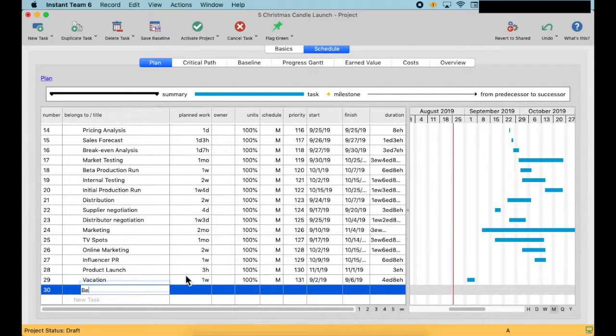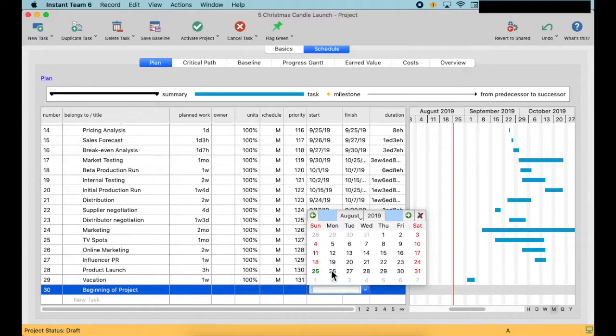A special task is a milestone. It is a specific moment in our plan. It is a task that doesn't have effort estimate. Milestone starts at the same time as it finishes. Often, it is used as beginning and end to the whole project.